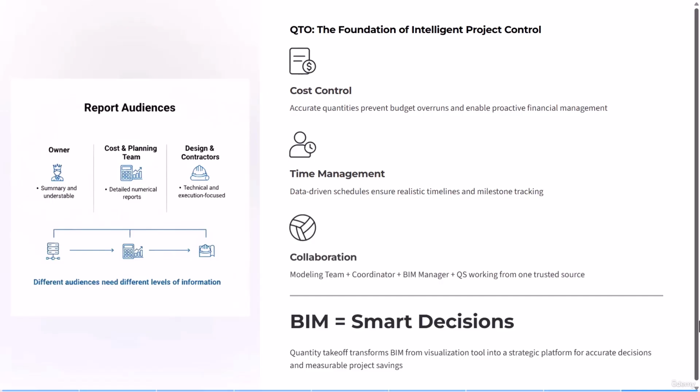When reports are precise, rework is minimized because incorrect quantities do not reach the site. Material ordering is more accurate, preventing shortages or surplus. And during construction, actual consumption can be compared with the model. Ultimately, at project handover, the final model LOD 500 serves as a real database of quantities, costs, and project progress.